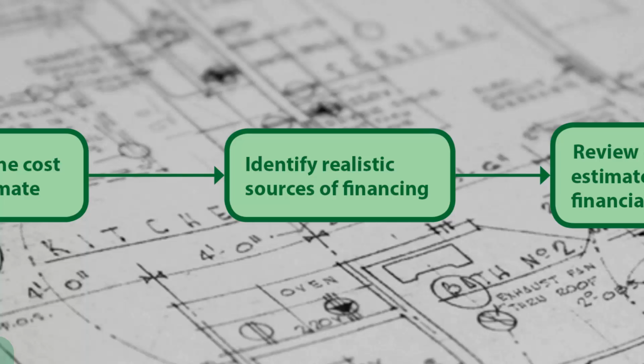For most projects that community-based organizations undertake, or projects promoted by local government, there will be a gap between initial cost projections and commercially available sources of financing. This is where various forms of public or philanthropic financing come into play, ranging from below-market financing to tax credits, to grants, to soft loans or other forms of direct financing. It is just as important to gauge the realistic likelihood of receiving such funding as evaluating the financing that may be commercially available. Specific uses also have access to specific funding sources. Affordable housing and other types of economic development projects often can take advantage of special pots of money.